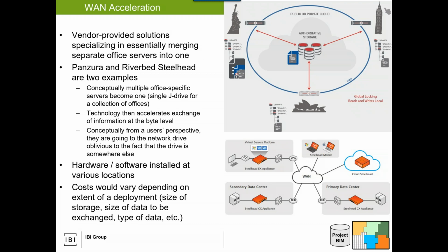If you build a collaborative solution around WAN acceleration, it's possible. As a project manager, I would see your diagram and I'd say, okay, but is this feasible? My project is starting in 2 weeks. How can we get Panzura set up in these 5 offices? And then they'll say, well, their setup time is quick, but their funding, we don't know. So there's always the risk when it involves on-premise hardware or on-premise type accelerators. So just keep that in mind.